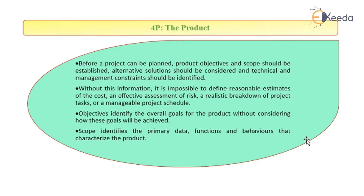Without this information, it is impossible to define reasonable estimates of cost, effective assessment of risk, a realistic breakdown of project tasks, or a manageable project schedule. So all the scope and objective definition is required before project scheduling is done. The project is broken down into parts which leads to manageable project scheduling. Objectives identify the overall goals for the product without considering how these goals can be achieved. Scope identifies the primary data, functions, and behavior that characterize the project product.